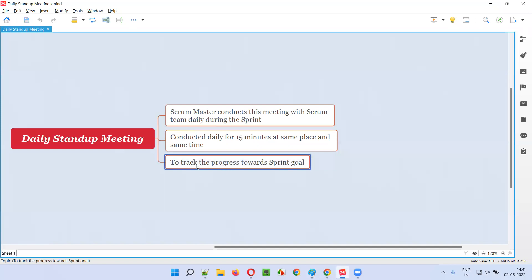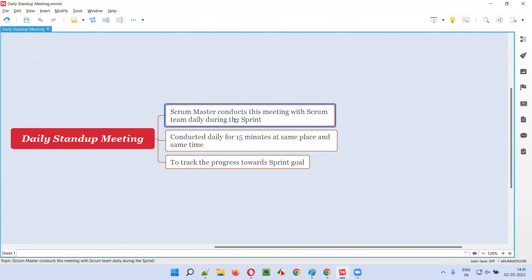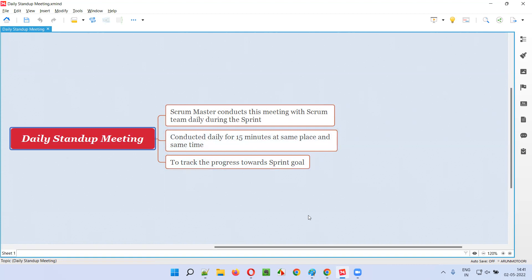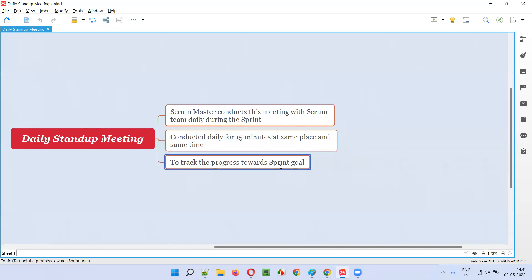The progress of the project towards the sprint goal will be tracked as part of the daily standup meeting or daily scrum meeting, where everyone will be standing during the meeting. The meeting happens for 15 minutes at the same time and same place. The scrum master conducts this meeting with the scrum team — that is the development and testing team — daily, to see what tasks the team is doing, what tasks are completed, what tasks are pending or planned for the next day, and what the current status of the sprint is — whether the team is on track to complete the work by the end of the sprint.